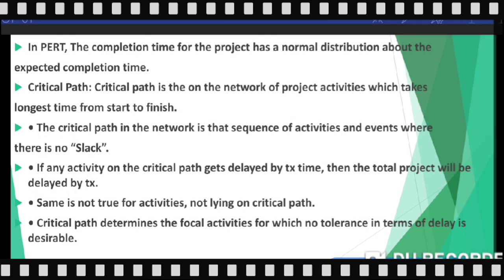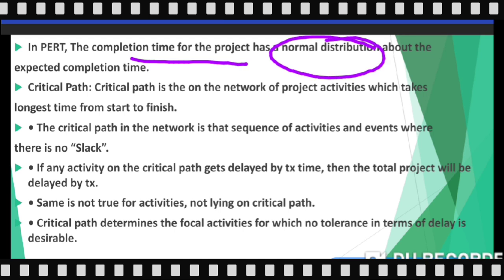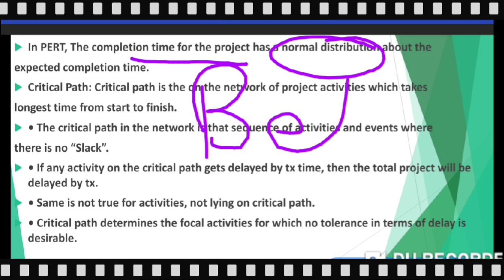In PERT, the completion time for the whole project has a normal distribution — keep that in mind. But for an individual activity, it follows a beta distribution. So we have two kinds of distributions: normal distribution for the whole project and beta distribution for each individual activity.